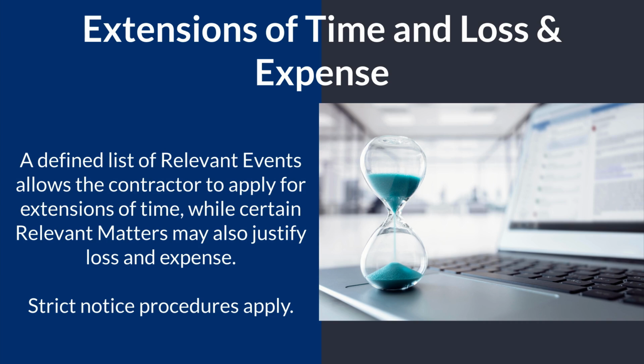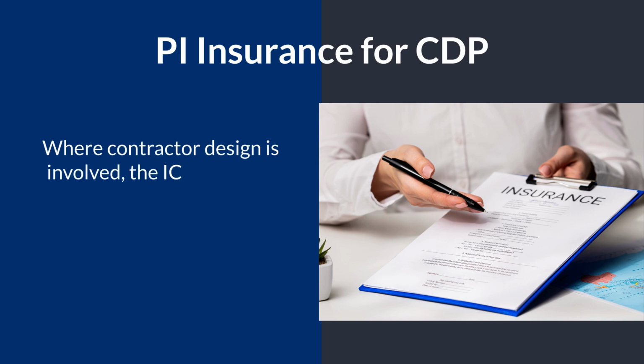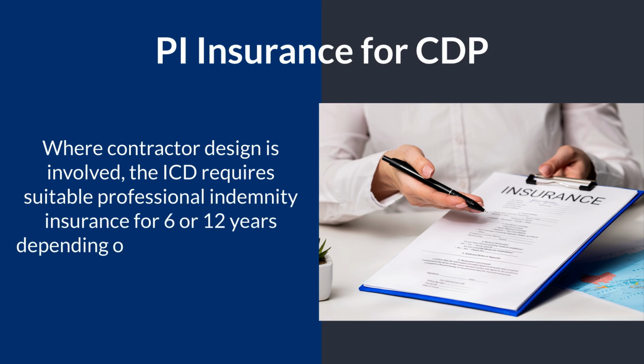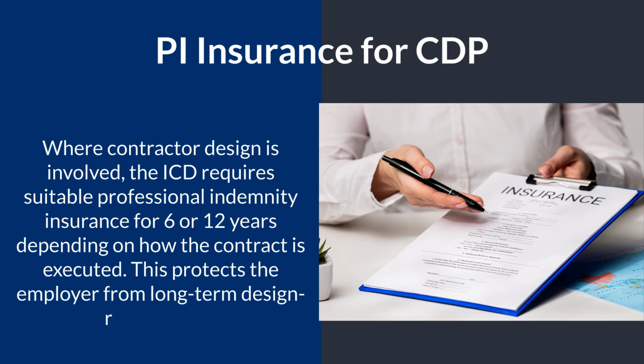And finally, we look at PI insurance for the CDP. Where contractor design is involved, the ICD requires suitable professional indemnity insurance for 6 or 12 years depending on how the contract is executed. This protects the employer from long-term design-related risks.